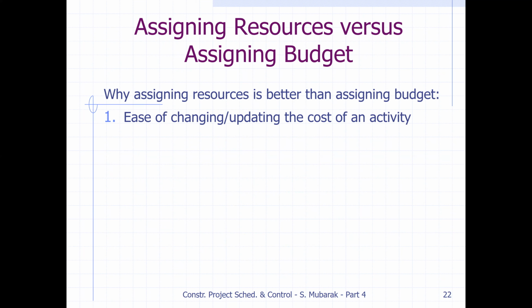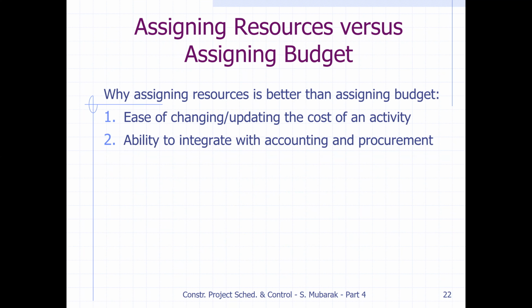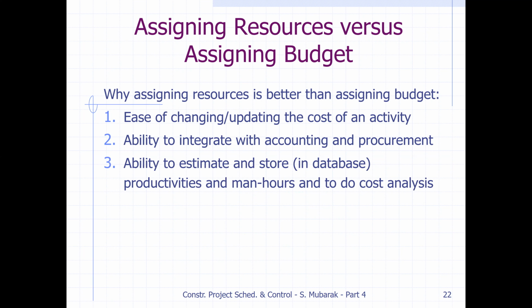Ease of changing and updating the cost of an activity: when we assign resources, it gives ease in knowing what we have to update in that activity. It also gives the ability to integrate with accounting and procurement, and the ability to estimate and store in the database. If we have assigned those resources, we get productivities, man hours, and can do cost analysis.